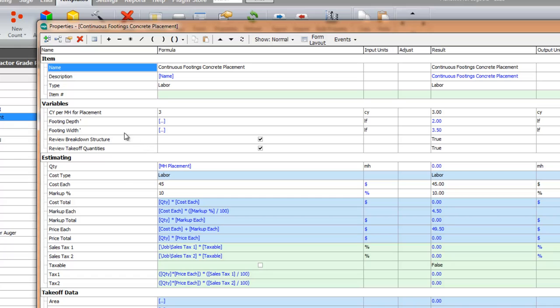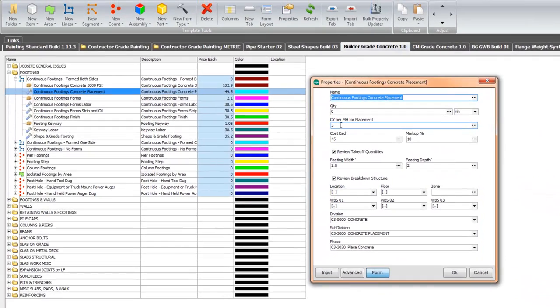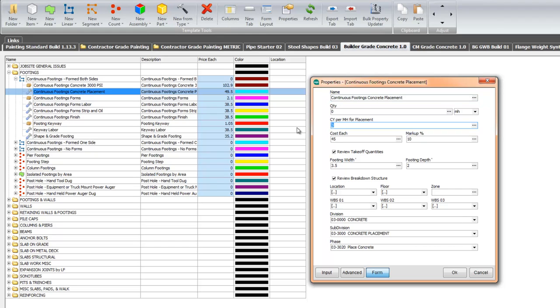So if I come into the labor issue and look at the variables, you can see that there's one variable that does not inherit: cubic yards per man hour for placement. So this is a value that you can change at each line item. So as you go through the plugin, for all of the labor activities, there will be a line here where you can input what the productivity is for this activity. In this case, we've said there's three cubic yards per man hour for placement. And again, if you change this, it will make the change permanent and leave it in here, and it will set up the default that goes over into the takeoff.